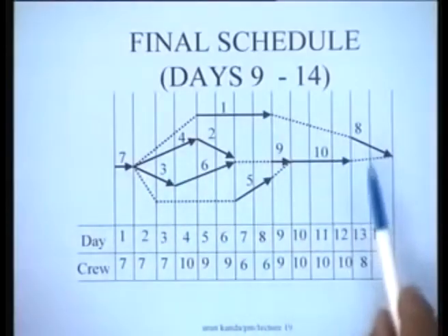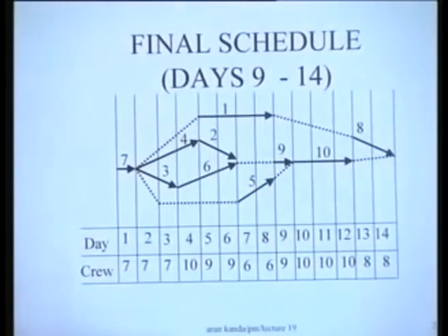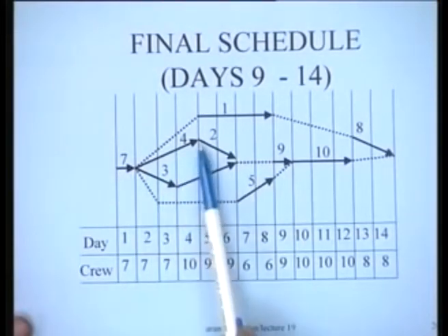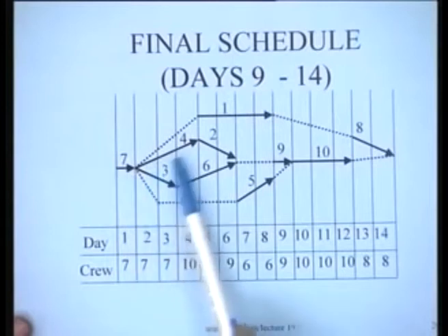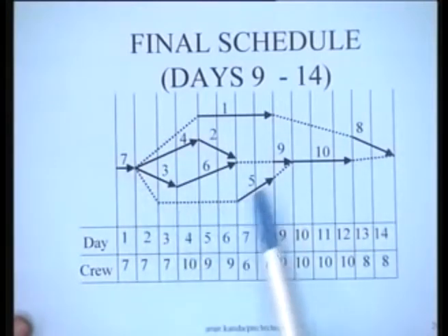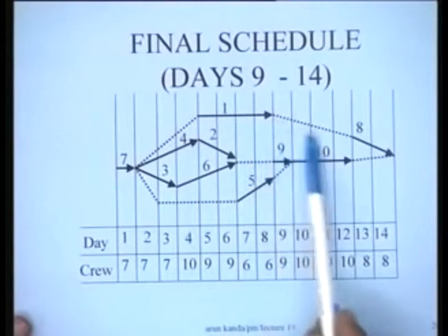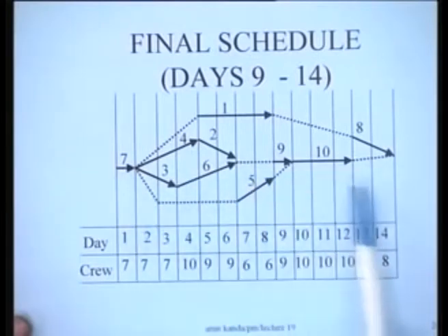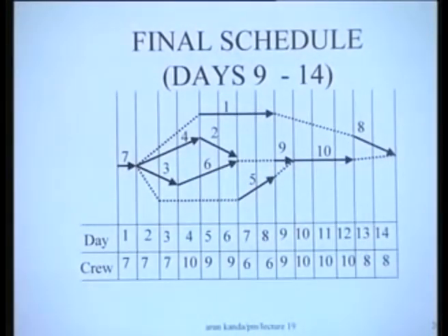Now, if you look at this schedule, this is the final optimal solution. You will notice some very interesting properties of this particular solution. First thing is, if you recall, the notion of the critical path vanishes. Isn't this something very surprising? Because earlier a critical path was an unbroken path, it was this one, this and this was connected to this, and that was the critical path. Now there is no path in the problem which does not involve some kind of float. There is no path, this one, this one, this one, this one, isn't it? So is there a critical path in this problem now?